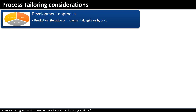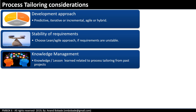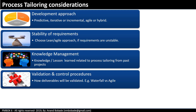Process tailoring considerations: key areas that lead to tailoring include development approach — the project manager defines whether it is predictive, iterative, incremental, agile or hybrid. Stability of requirements also drives the approach; the project manager will choose a lean or agile approach if requirements are unstable. Knowledge management: if a project is a repeat of a similar past project, knowledge and requirement management will help with related systems and their possible reuse. Validation and control procedures will differ based on the selected approach — for example, the business acceptance process is tailored based on whether a waterfall or agile approach is chosen.